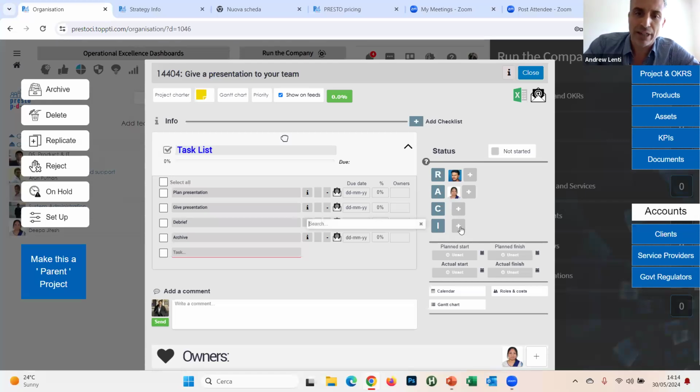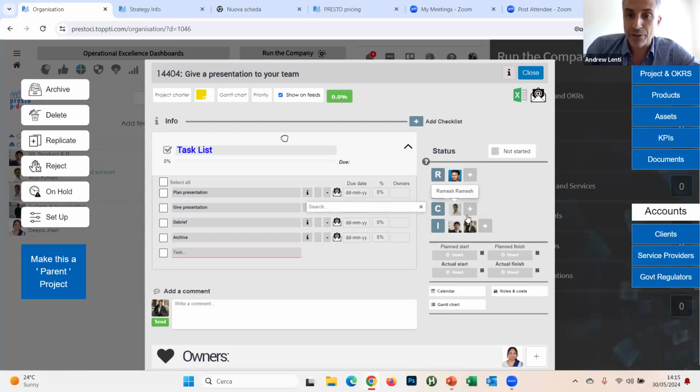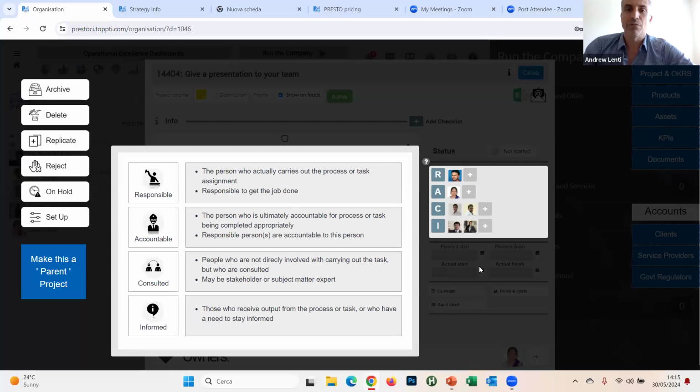And she might say, Binoy, I'm going to keep you informed on this one. So there's Binoy. And I might even say, guys, why don't you keep me informed as well, how the training is going. So there's me. And she might ask her colleague Ramesh or Arun to give her a hand on this. So they become the consulting partner. Not to go too much into it, but Presto's all about role and responsibility definition. And there's our AC matrix telling the company that we're identifying tasks, we're identifying a team, and we're going one step further and identifying roles in this activity.